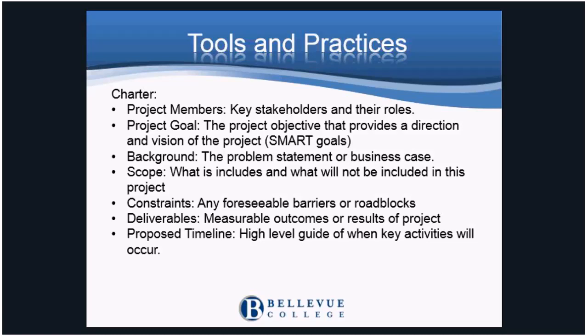The scope of the project is a summary of what will be included in the project and may have what will be excluded. A scope statement was covered in scope management and is coming up as a document to review. The scope sets the boundary and requirements that all the other planning documents are built on. The timing is important here too. The scope document is created during the planning phase and needs the details, but the charter is created during the initiation phase and includes very basic building blocks of the project.